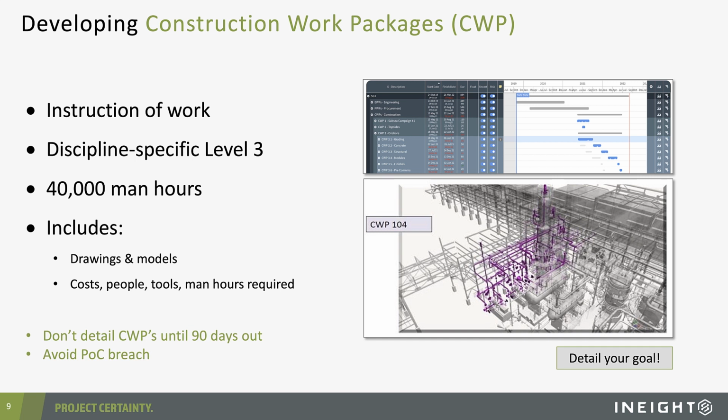That constraint register may not yet be completely mitigated. There's very little point in defining this level of plan detail until we are a relatively short period away from the actual execution.